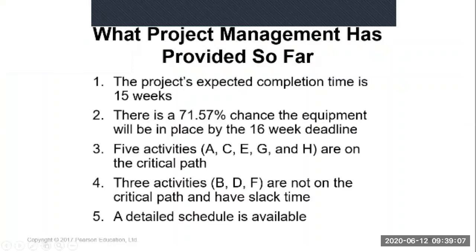All that we have calculated: what have we done so far in project management? First, we identified that the project completion time is 15 weeks. And there is a 71.57% chance that the equipment will be placed within the 16-week deadline.